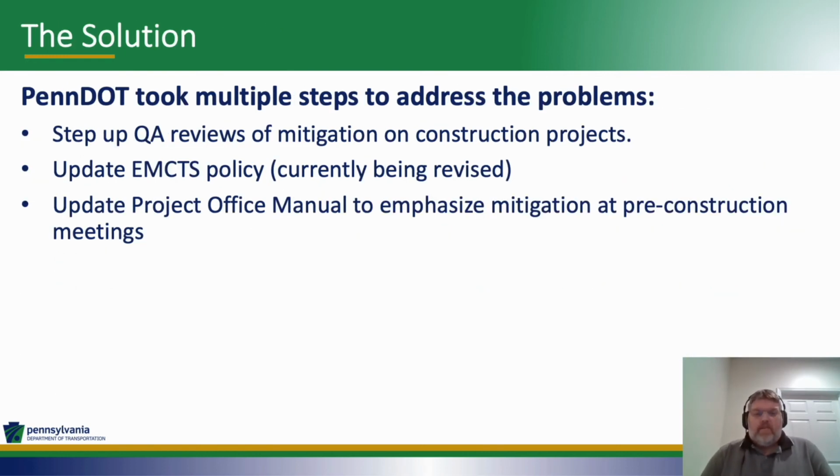So we worked on a solution, and the solution was to do a number of different things. But the first was very simply to step up the QA reviews on mitigation on construction projects. And we now get a quarterly report from the QA unit under construction, led by Brent Trivelpiece, who fills us in on the inspections they've done and whether or not there were any problems with mitigation.